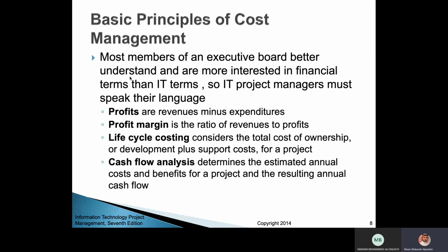Also, the support costs. After finishing the project, after developing the application, you still need to spend some money to maintain it, to do backups, and to pay the people who are going to run this application, not developing it but using it, the operation people. These are costs also. So support costs. If anything is required to modify the application, any related cost will be considered support cost. So this support cost plus the development cost will be considered the life cycle costing.